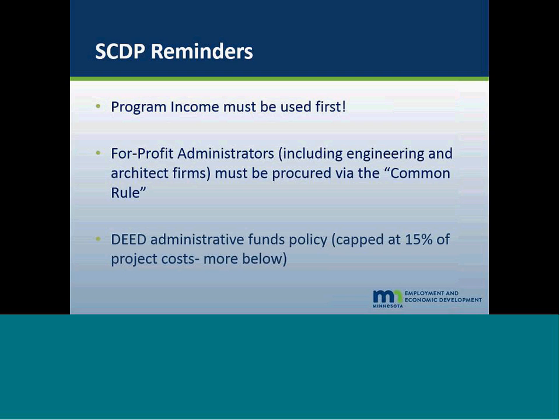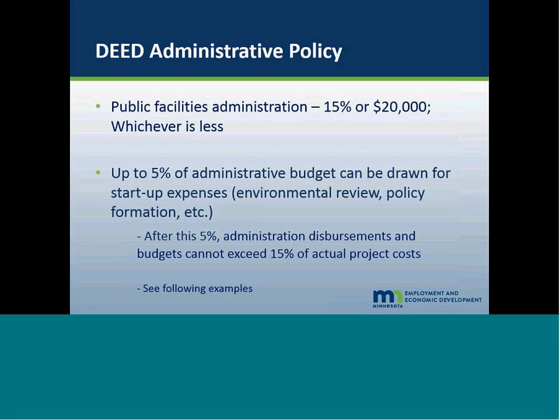Another important point is the administrative funding policy. It is capped at 15% of project cost. It's different for public facilities: it's 10% or $2,000, whichever is less.